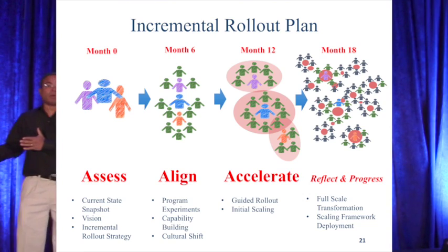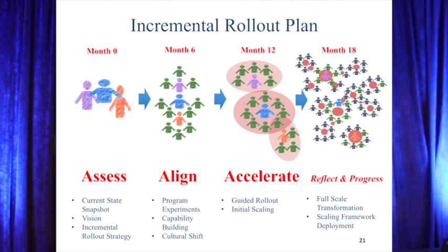They also didn't want to do all projects in one big swoop because they have several hundred projects. So they said they'll start at month 0 with assessing, and then they will do 5 projects as a pilot in the first 6 months. Then an extended pilot for 12 months, for another 15 projects. If these things work, at every step they check, they'll accelerate, and then they'll progress and scale to the enterprise. So that sounds like a good plan.